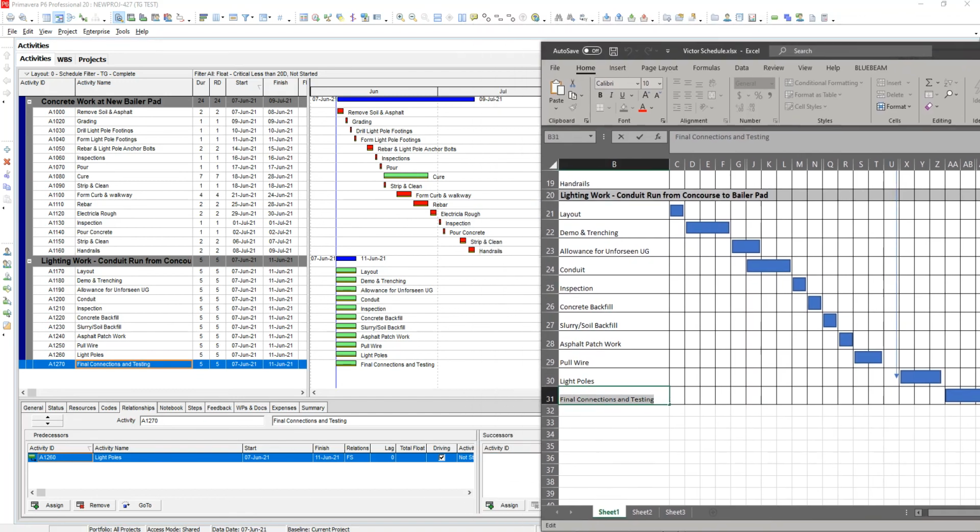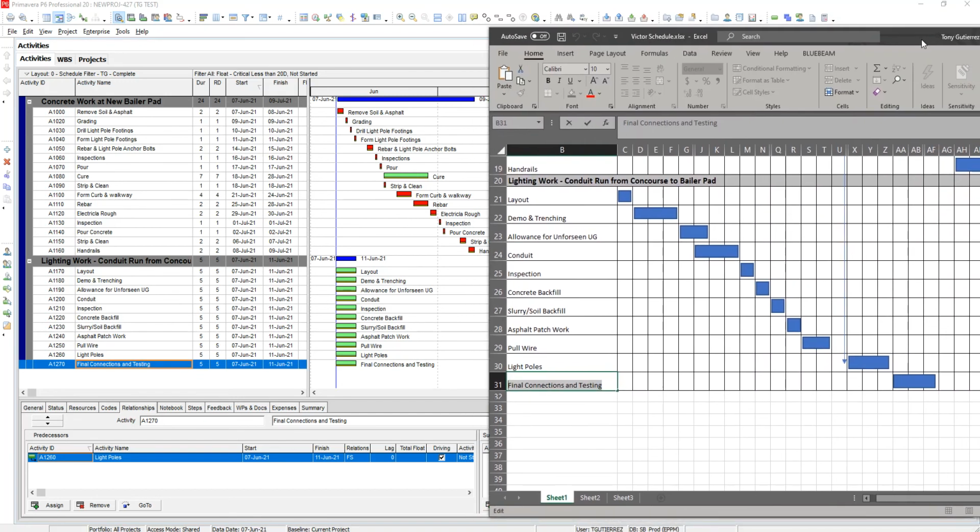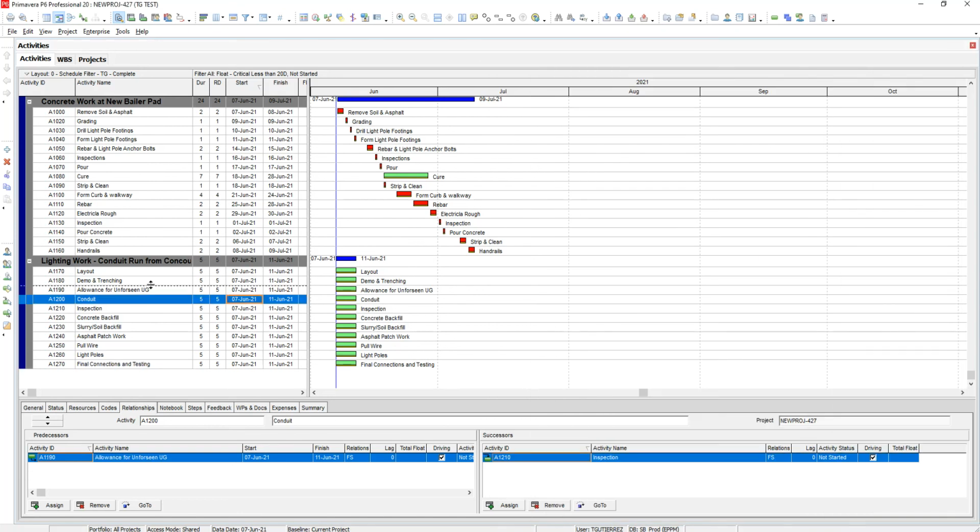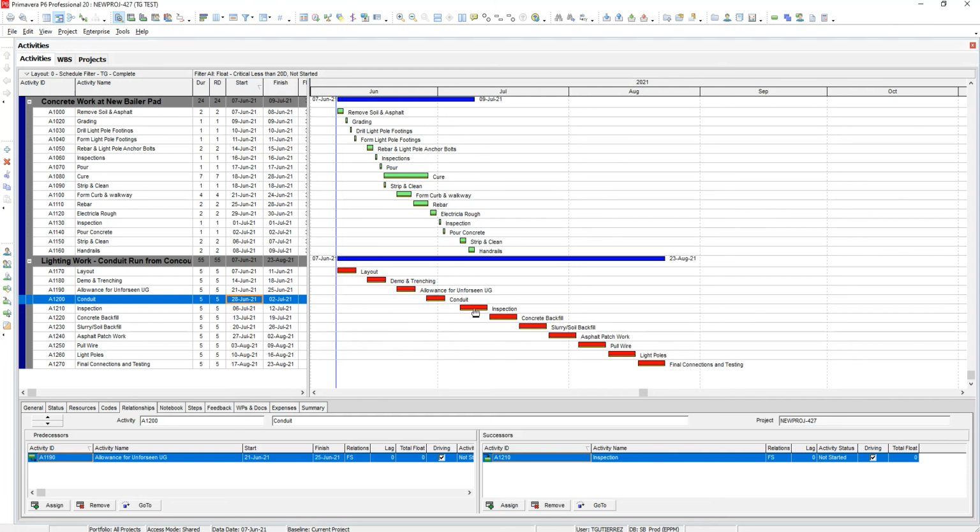So in this case, nothing's happened. It still looks like everything's stacked. So I'm gonna press F9 at least to see that this is called cascading. When things stack up like this, kind of like a stair, it's called a cascade. That's actually a good way to check schedules. If you see that it's not cascading, like right here, you can see something's weird. Something is weird, but here we have a reason, right? Normally you want to see cascades unless there's a reason for it not to cascade.